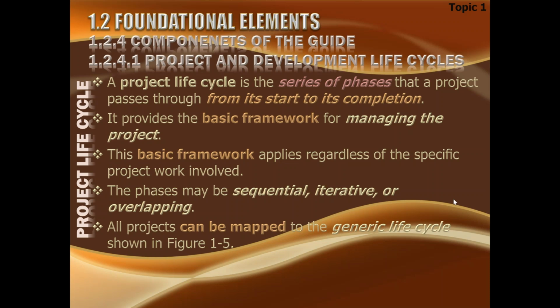And the maximum number of levels of phases should be not more than 3. Do not go beyond 3, because after 3 levels, it will start getting confusing. And 3 levels, I mean, the top level is your project, second level is your phase, third level is your sub-phase. Beyond that, if you want to make more sub-phases, then this is going to complicate the whole issue. This is equivalent to having so many phases.